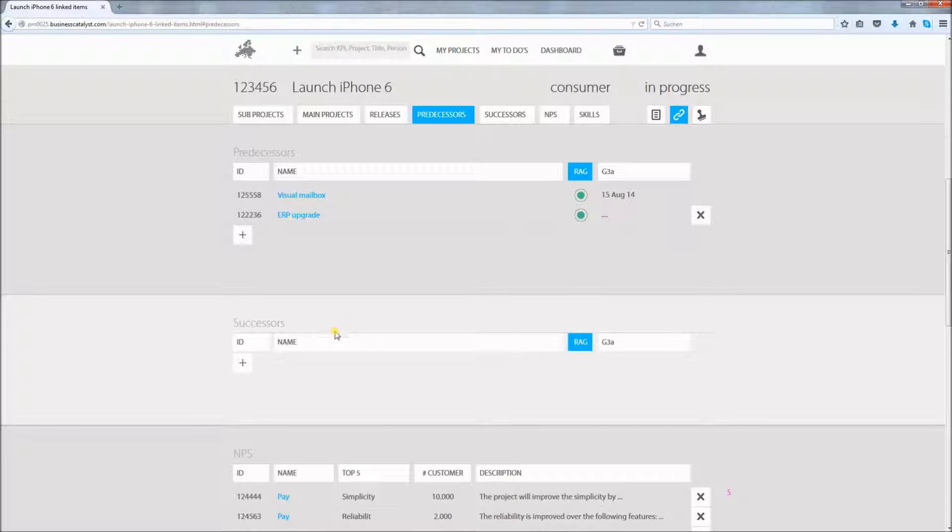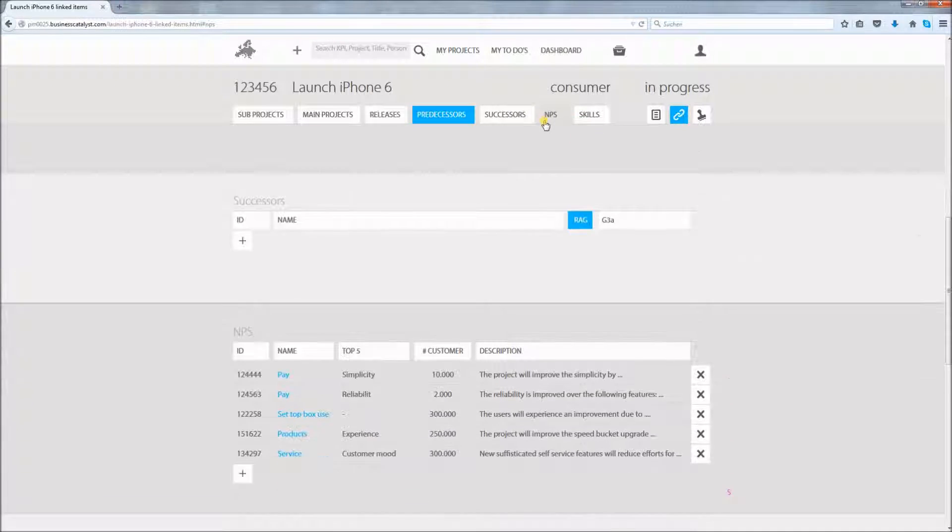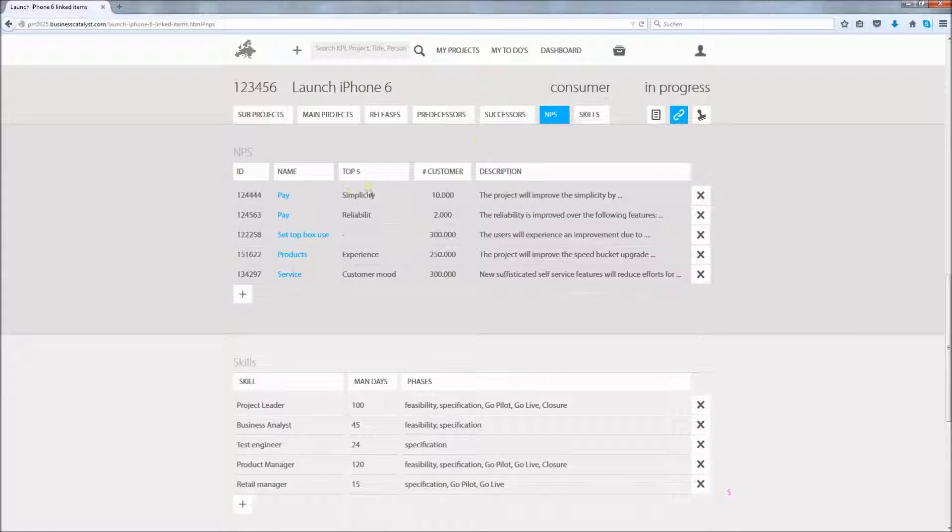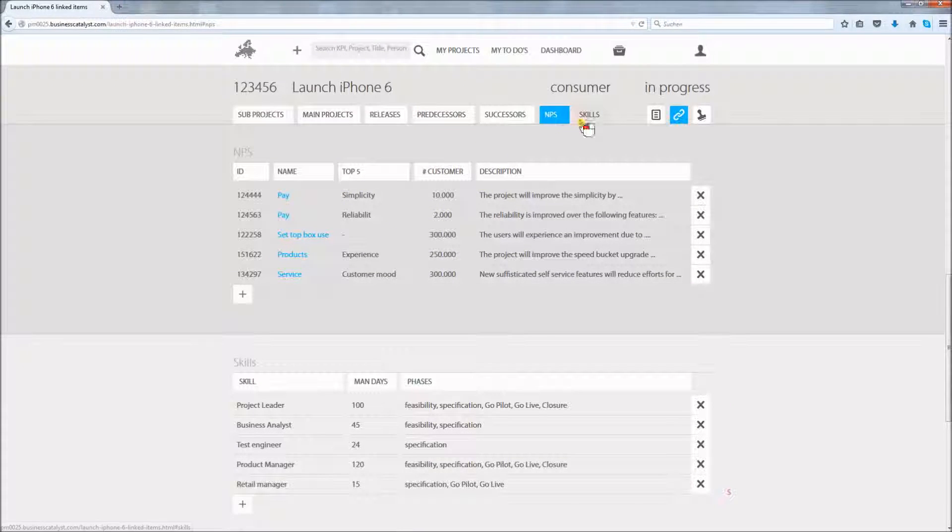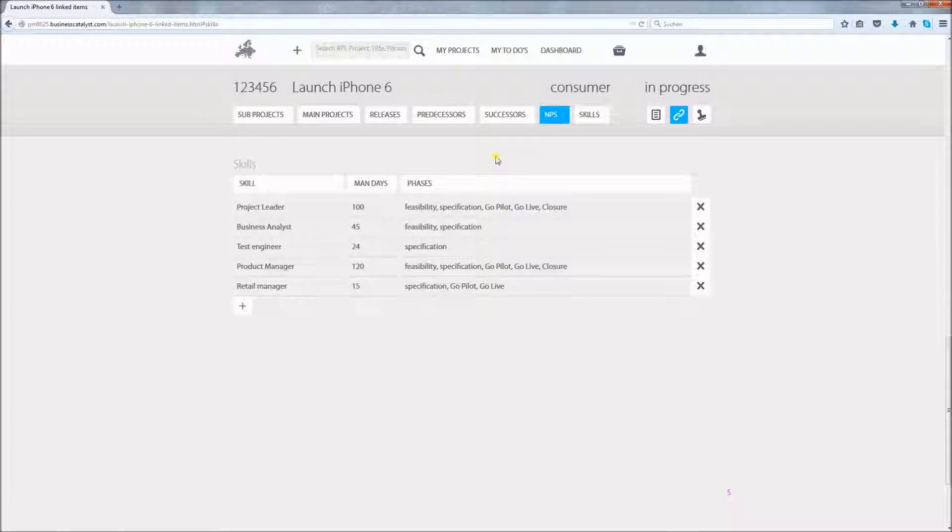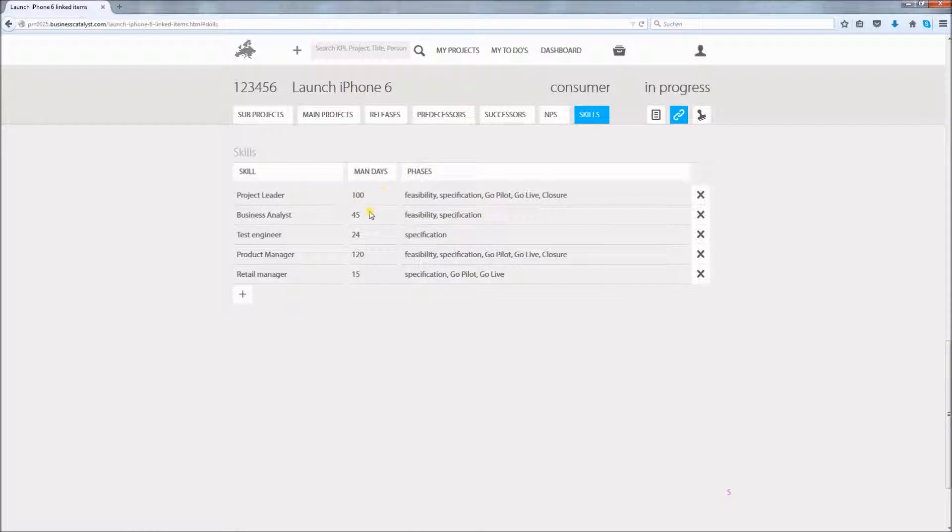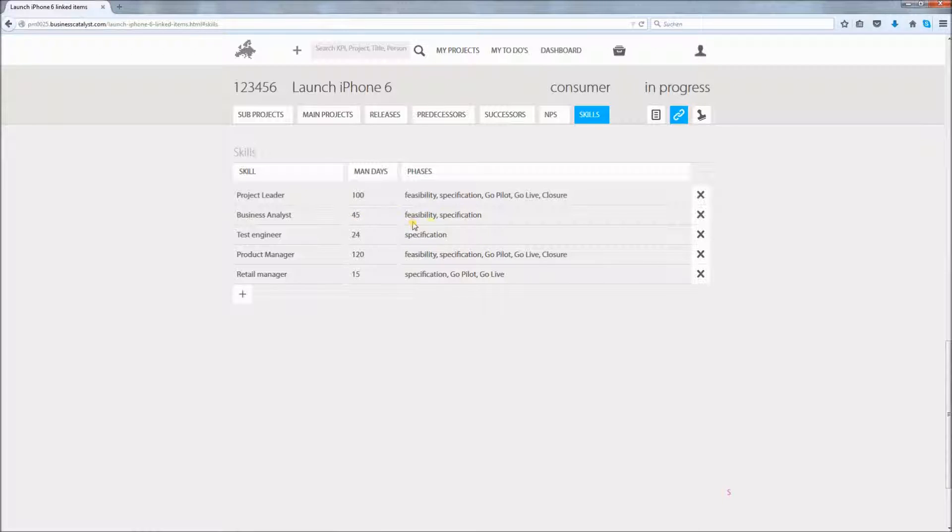There are no successors to this project. The iPhone project has impact on 5 KPIs as the NPS section shows. And the project requires several skills. For instance, 45 mandays of a business analyst in the project phases feasibility and specification.